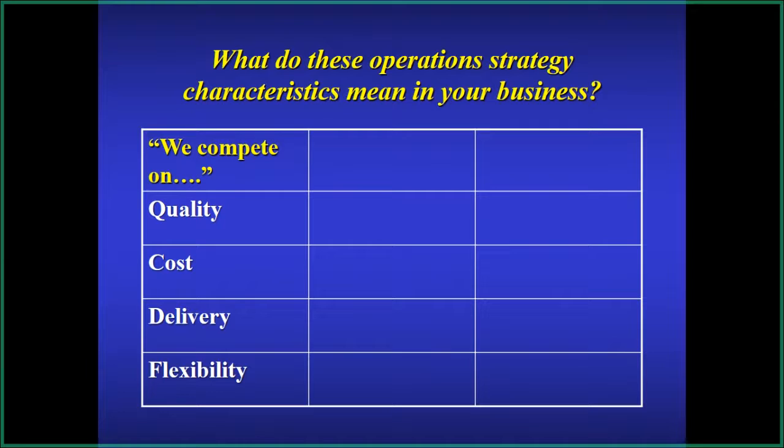So if you're delivering drywall and you're doing a super good job, I can have all the drywall on site 3 weeks before we need it. Well, what are they going to do with 3 weeks worth of drywall when they're trying to get a lot of other things done? It's going to get in the way. So just in time can be a lot better than early.